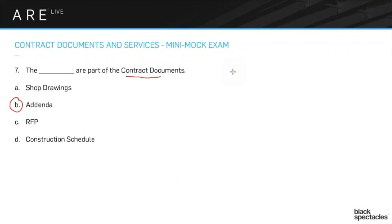So when do the addenda happen? You put together your set of drawings, you're getting ready to bid, and as you bid them out there's inevitably some confusion. A contractor calls and says there are two different things in two different locations. You take their question, compile a few of those questions, answer them in written form, and send it out to all the bidders — to make sure you get apples-to-apples bids. That document is called the addenda. You're altering the original contract documents, adding or updating detail, and once you produce an addendum it goes in and becomes part of the contract documents.